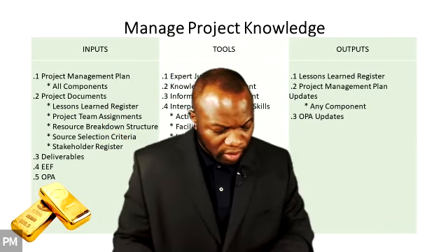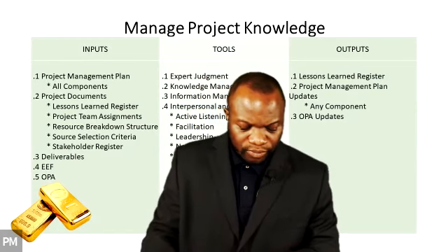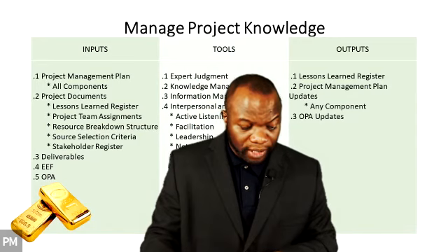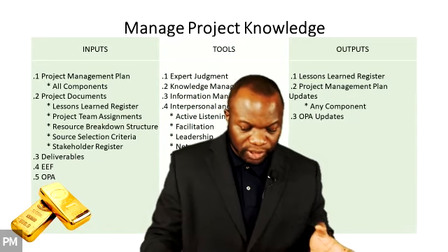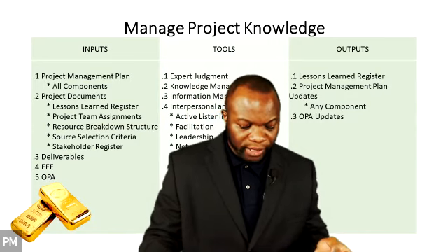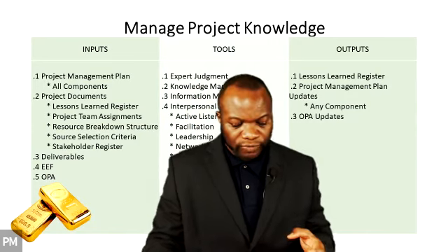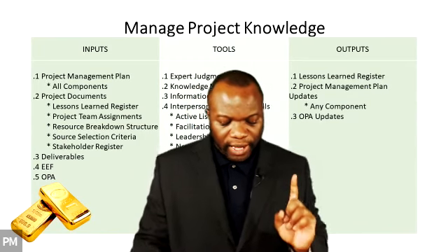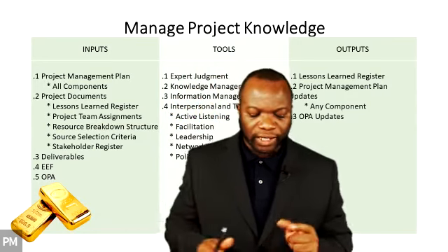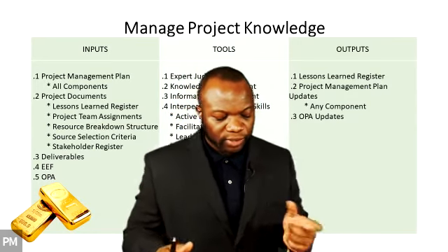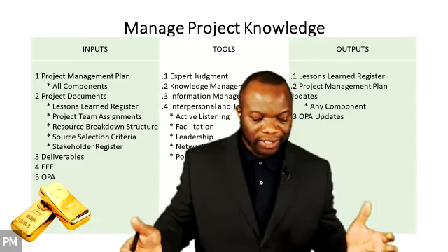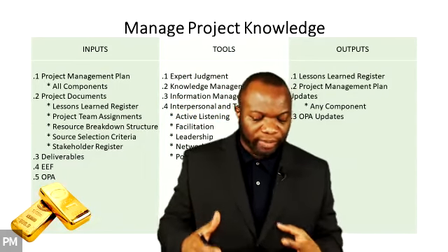Look, it says, all projects create new knowledge. Some of this knowledge is codified, embedded in deliverables, or embedded in improvements to processes and procedures. Existing knowledge can also be codified or embedded for the first time as a result of this process. Watch this. If an existing idea for a new procedure is piloted in the project and found to be successful, what is it? It will eventually become an OPA.